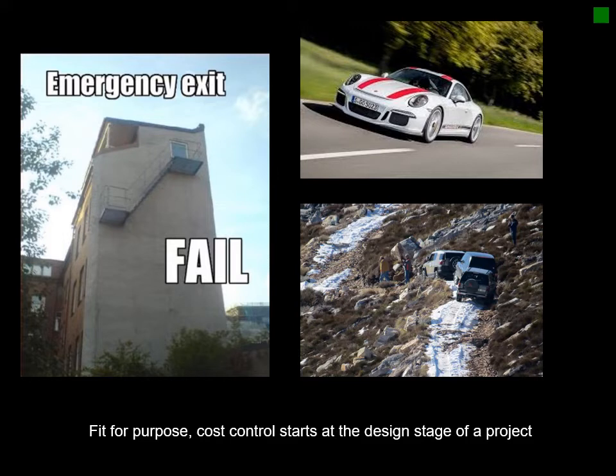It doesn't matter that you have a building standing, but if you can't sign off the electrical installation or the mechanical installation or the ventilation, or in this case the fire escape, which is required for buildings of this size, then the whole project can fall flat because of it not being in the design and within the budget. So one has to think about everything before you actually kick off the project.